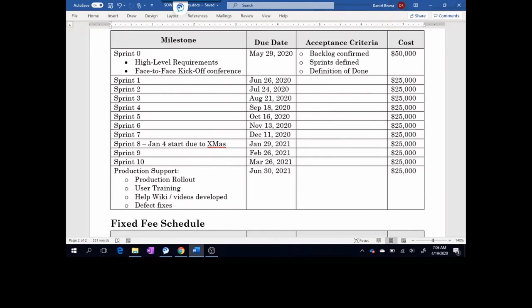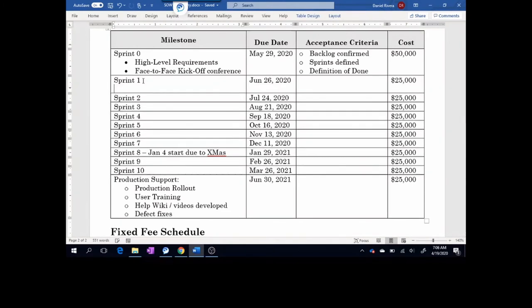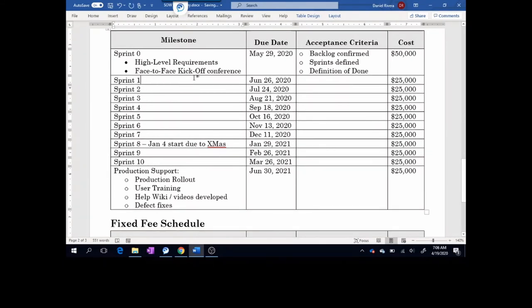Within each sprint, it's very critical in your acceptance criteria to list out the definition of done — what artifacts or outcomes confirm that sprint is complete. This includes sprint reviews as well as sprint planning for the next sprint. You can put that in the acceptance criteria column, or in the milestones column you can have sprint one as a header with sub-bullets detailing exactly what's going to happen in that sprint. If you can detail that out, that'll be fantastic, because then there's no misunderstanding.